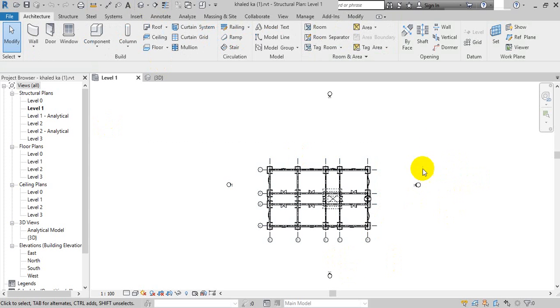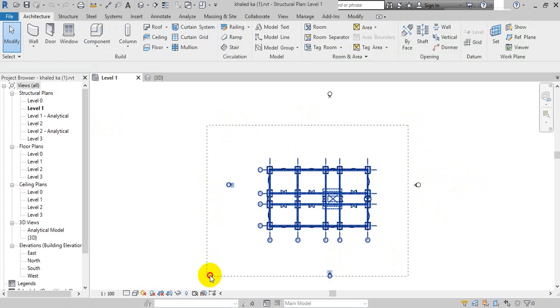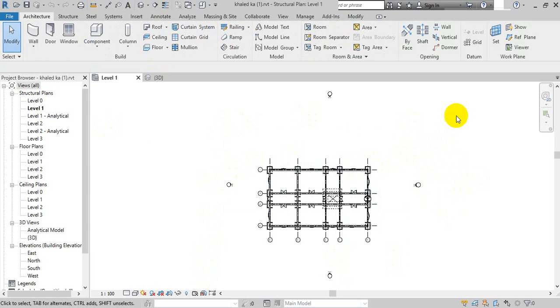Then what is the other important advantage of Navisworks? There is an option called clashing. Clashing shows clash detection between the coordinated MEP and the civil engineering works. For example, if we have a pipe across a beam, we cannot figure that out by just the design, the drawings and the calculation. We want to simulate it to find it before we start, or before the problem happens.